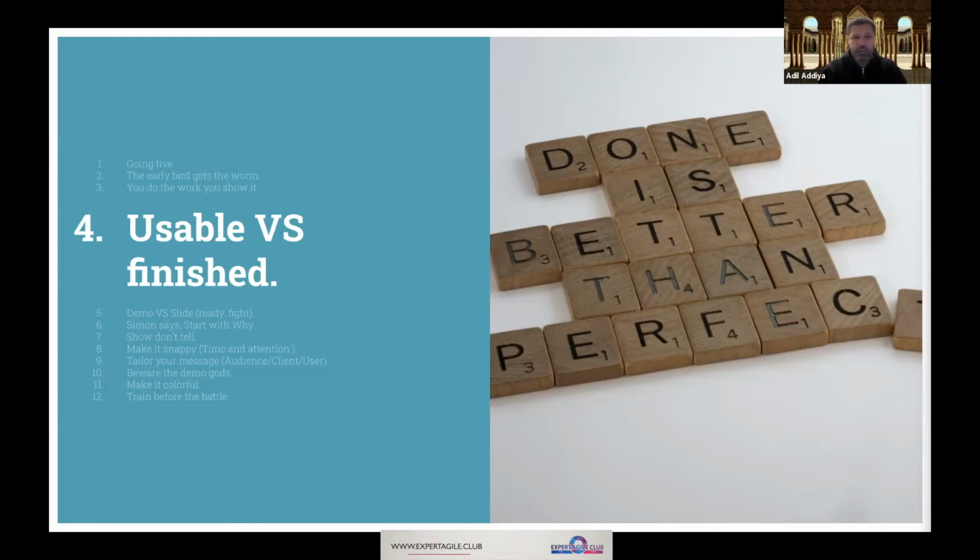Even if a feature is not completed, as long as you have done enough work for the client to use it as intended, even if it's a little bit buggy or still lacking some testing, it might be a good place to show it to the client and see how they react to it. Maybe what you are building is not even something they are looking for, or maybe it is, but they might need some little adjustment, or maybe the rest of the feature is not even needed. So once you have something that might be usable, it's time to show it.